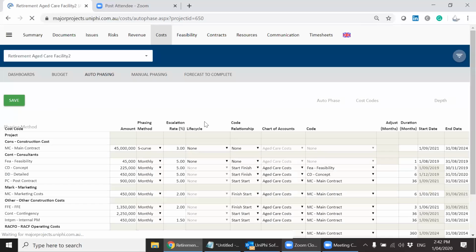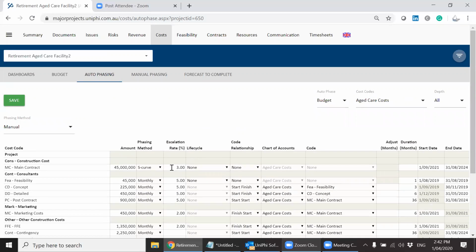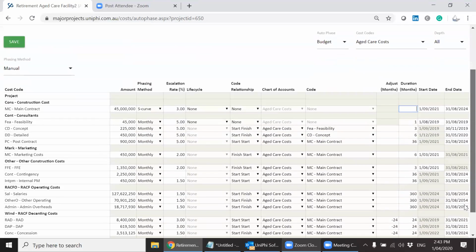So when you select those, they automatically go into the relevant fields in that phasing screen. That escalation rate isn't getting keyed into this screen, it's getting keyed into the one data page, and it's automatically, like an Excel link, getting put into there. The duration has now disappeared because I linked it to a field called duration, and that hasn't been keyed in. And then the start date gets derived from the start date. 36 months plus the start date gives you the end date, and then everything else links to that. So you can see start to finish on different codes, and it'll just concertina down.